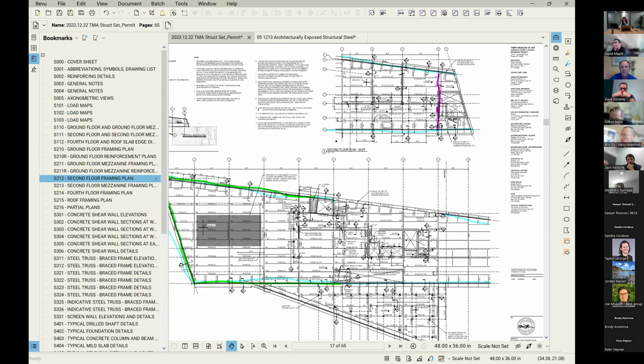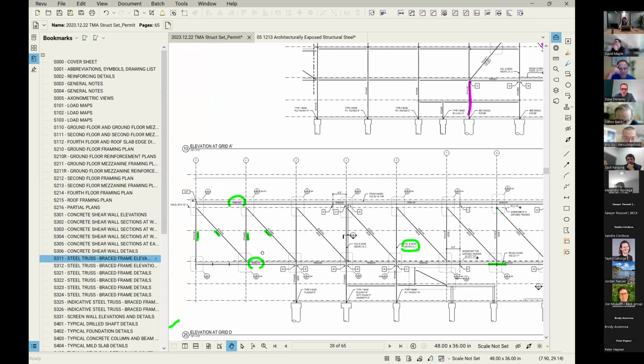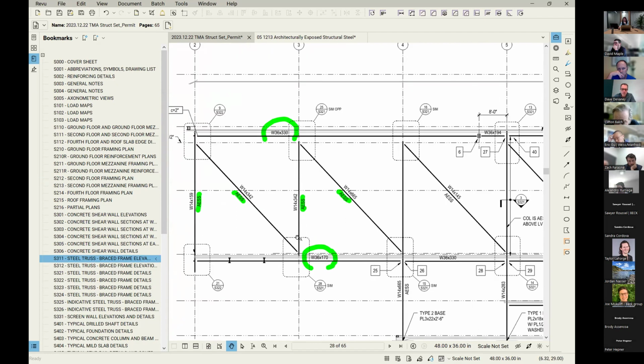And then these trusses, this is a relatively new thing for me. I'm guessing they typically assemble them in segments on the ground and fly them up in segments. I would absolutely expect that. We had some conversations with fabricators early on, mid-design, trying to understand how they might break them up. They're so tall, 36 feet tall. One of the options discussed was that they would be fabricated in as long of segments as possible and spliced potentially at the midpoint. You take two pieces and bring them together in the field. Other options would be long chord pieces with splices just off the nodes.